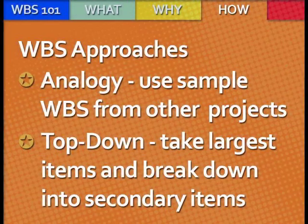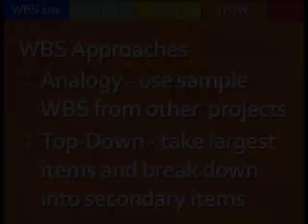Another method is the top-down approach. This approach begins by taking the largest items for the project and breaking them down into secondary categories. This continual process will provide greater levels of detail. Project managers who primarily focus on the big picture of a project find this method the most beneficial.